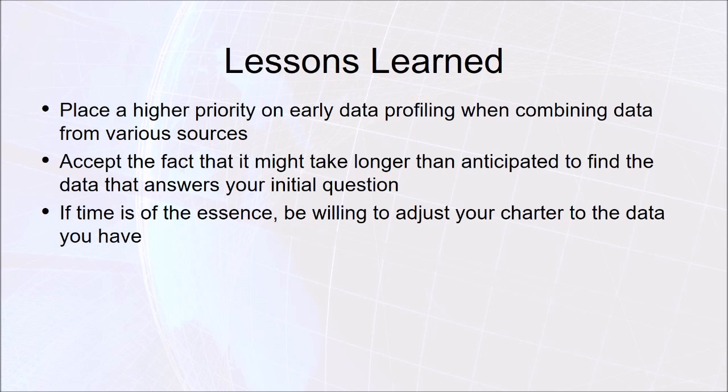So, in wrapping up our presentation, I'd like to just take the time to discuss some of our lessons learned from this project. The first one being the need to aggregate and classify data early on, specifically when the data comes from various sources. So we had one source for our medical data and one source for our air quality data, and we could have benefited from really getting our hands dirty with the data earlier on in the project timeline.